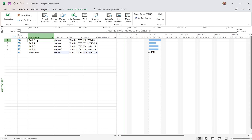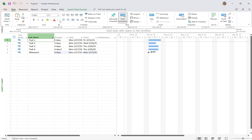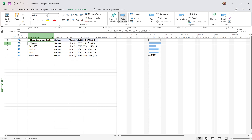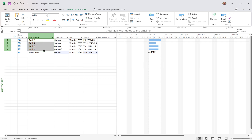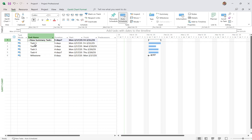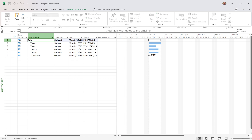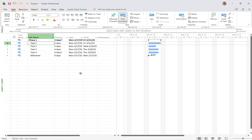I'm going to come to Task 1, go to the Task Ribbon, and click Insert Summary Task. We can actually put in a summary task. If I undo that and select these tasks, then use Add Summary Task, now it knows that this summary task is going to summarize the tasks we previously selected. Let's give it a name — we'll call it Phase 1. You can see that it's currently at five days, saying the project is going to take five days.